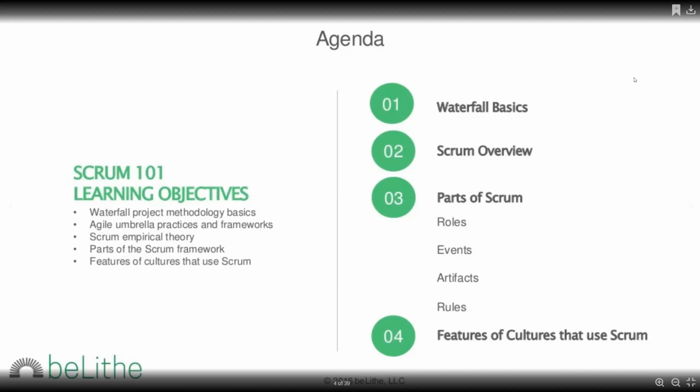So you communicate your concerns with me. We record that and keep that in a backlog to be revisited. And as a product manager, I have to consistently go back to that backlog to do what we call grooming. Go through the backlog and see that the user stories have all the requirements and all the supporting artifacts to make them ready to be worked on. When you groom it, then it can be considered during sprint planning, and then it can be part of your sprint in development.